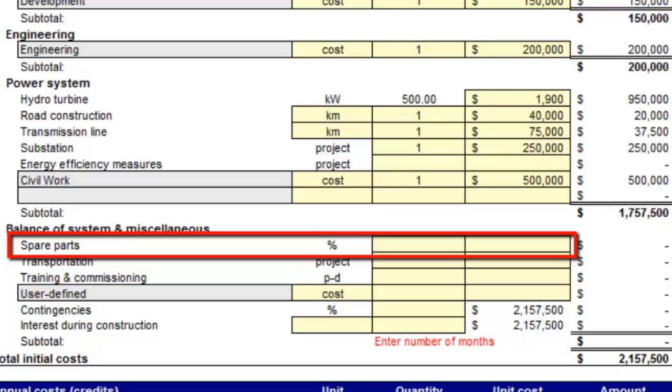The extent of the inventory required will depend on the reliability of the system, warranty, complexity of equipment at the site, transportation difficulty, and availability of off-the-shelf components. For smaller systems, the cost of spare parts is normally part of the purchase price request to the manufacturer. The supplier would need to be contacted in order to obtain prices or other information required for a more detailed feasibility study.